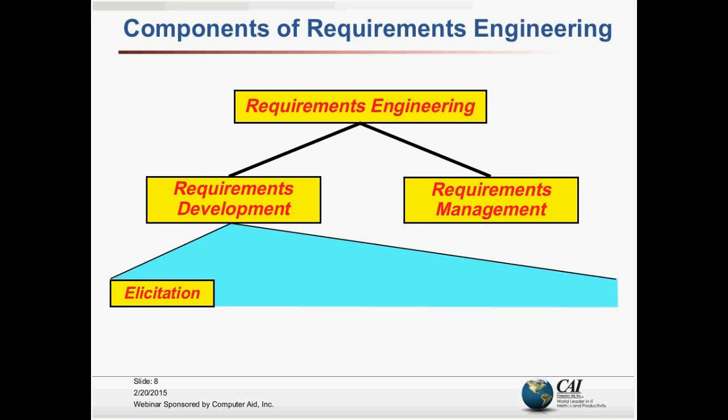There are four subcategories within Requirements Development. The first is elicitation — all the things we do to get requirements. Sometimes people talk about requirements gathering, and I don't like to use that term because it conveys an impression of walking around with a basket and collecting them. Elicitation is a lot more than gathering; it also involves discovering, inventing, and deducing requirements. But we have to have something to work with, so we start with elicitation.